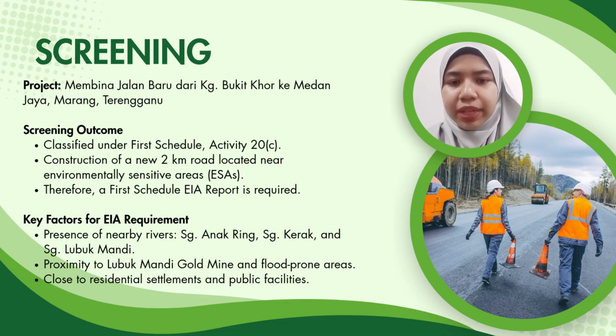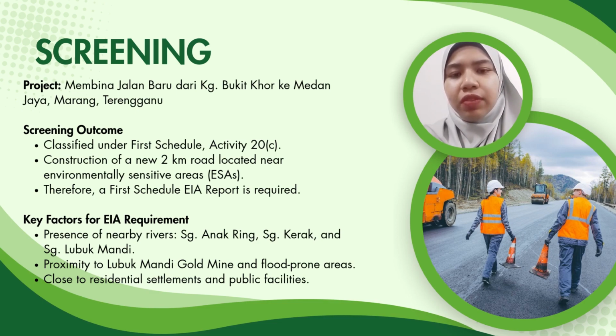I will first explain the screening process in the Environmental Impact Assessment or EIA. Screening is the first stage of the EIA process. Its main purpose is to determine whether a proposed development project requires an EIA study and to identify the category of assessment needed based on the Malaysian Environmental Quality Prescribed Activities EIA Order 2015.